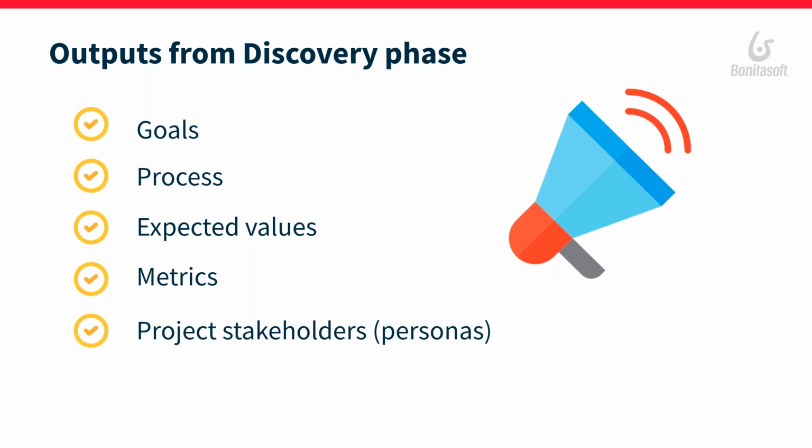And in order to start with something, you will choose the first process you are going to optimize. Don't forget, this first process has to be a core process, because you need to make sure that people will be motivated to change. You will make sure that also the management and the top direction will be motivated and will sponsor it, and they will see a real value. And also because then people see the benefit for the company. But it has to be also a process that is not too complex. Otherwise, you are going to focus on complexity and not on bringing value.